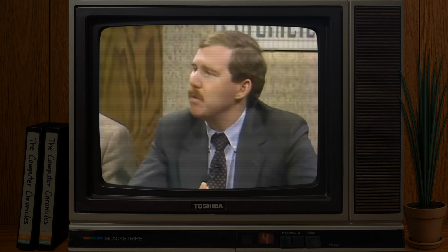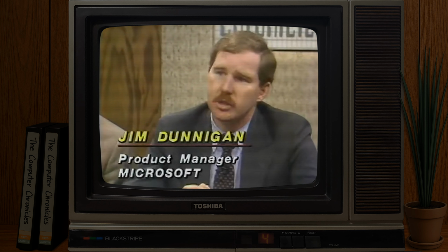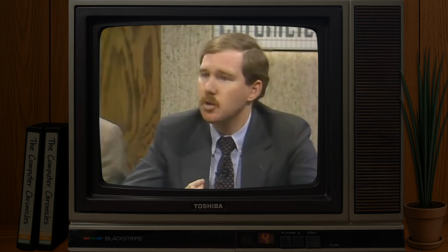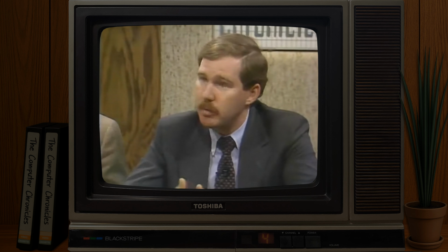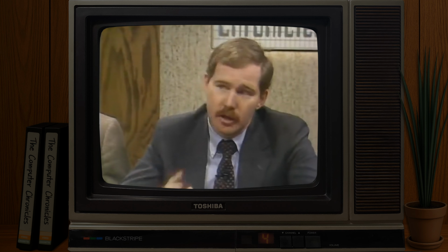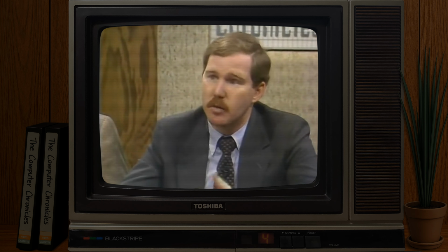Okay, it's different in a couple of ways. One thing that we take into account is with resources, we have individual resource calendars. So if you have a particular resource that is going to be on vacation for 2 weeks, or a piece of machinery that's going to be unavailable for several weeks, you can actually go in and block that time out on their particular calendar, and when the scheduling takes place, it will take into account the availability of those individual resources.